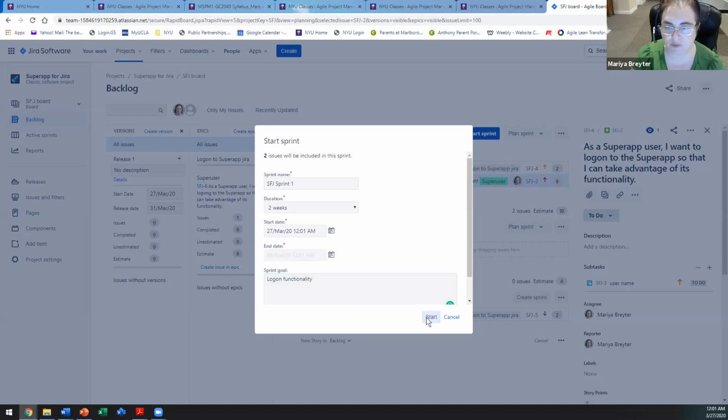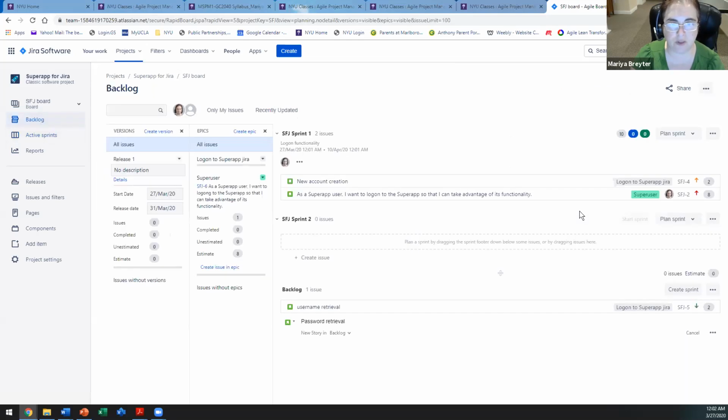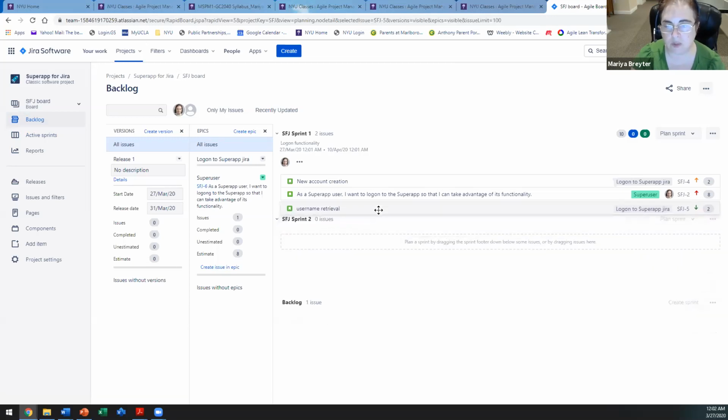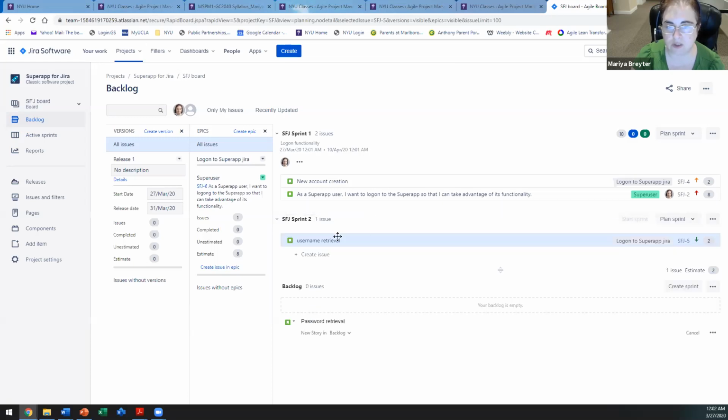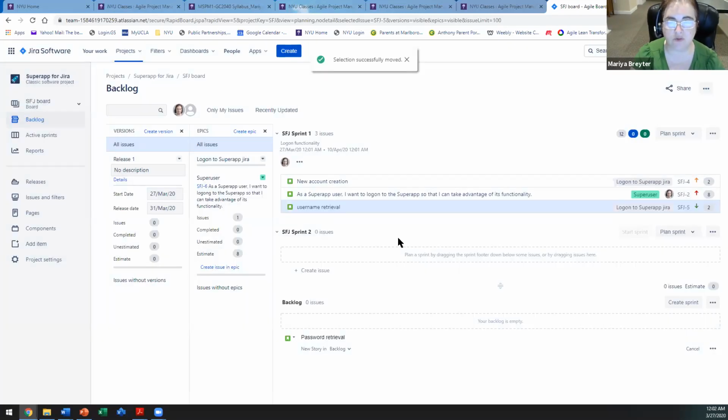I'm starting the sprint, and then all of a sudden, for some reason, a new team member joins. I find out that I can do another story, which is a bad practice, and I would never advise to do so. But let us say my team decides, once we started the sprint, to take 2 points of additional work into the sprint. Immediately I get a notification that I'm affecting sprint scope. It's not advisable, and we will see later in the reports how it's reflected in reporting. But for now, I have my backlog.